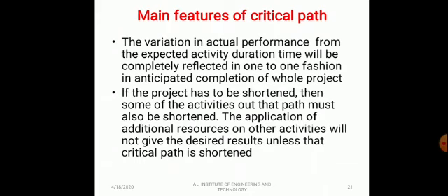The variation in actual performance from the expected activity duration time will be completely reflected, in one-to-one fashion, in the anticipated completion of the whole project.